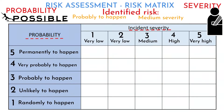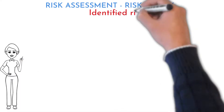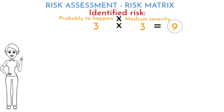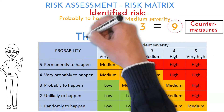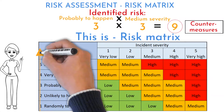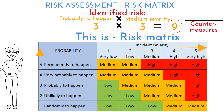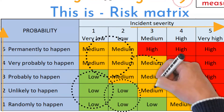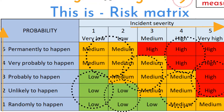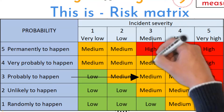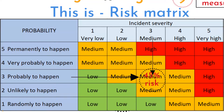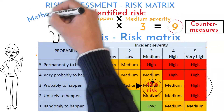Match each identified risk with a probability and severity number. There are multiple options to identify risk seriousness — you can multiply probability and severity numbers; the higher the calculated number, the higher the risk seriousness. An advantage of this approach is that you can have countermeasures listed next to each risk. For better risk seriousness visualization, use a risk matrix. There are two axes on the matrix, one representing probability and the second severity. The matrix is divided into three sections: low risk seriousness (the green one), middle (orange), and high risk seriousness (marked red). Enter the matched risk numbers to each axis and find the meeting point — the seriousness level is now obvious and visual. You can use percentage numbers for more precise seriousness definition if required. I suggest using a combination of both methods to visualize and address risk with countermeasures.